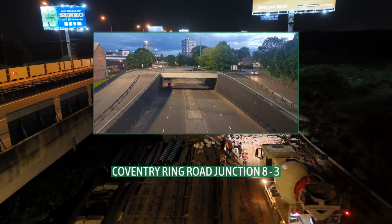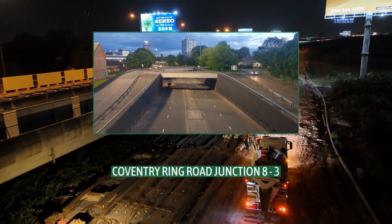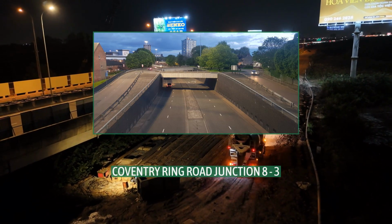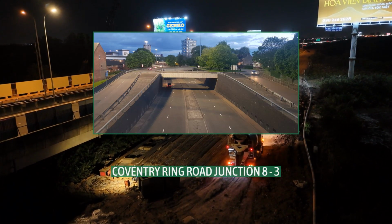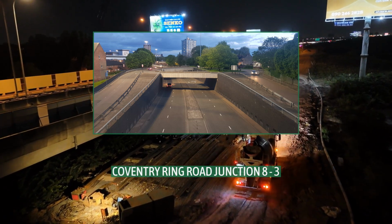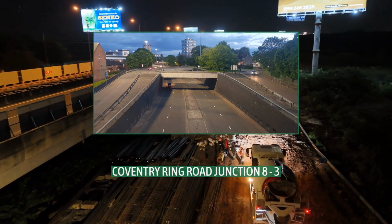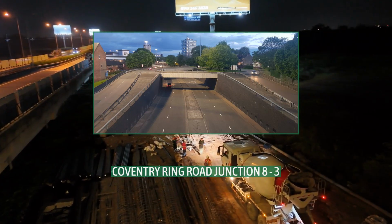Work began in March 1968, and by June of that year, the culverting work on the Sherborne and erection of the concrete vertical supports was underway, with around 6 columns completed every week. From September 1968, a total of 765 concrete box beams were brought by road from the Dowmac concrete plants at Tallington and Gloucester, each weighing around 41 long tons with lengths up to 82 feet. T-beams were also imported for use on the slip roads.